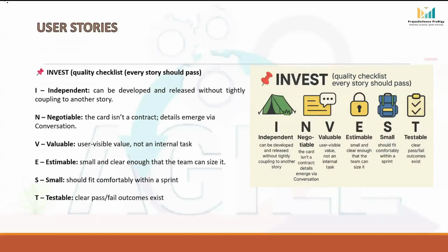INVEST. This is a quality checklist for user stories. Every good user story should pass this INVEST test. What is INVEST? I for independent. A user story should stand on its own. This means it can be designed, developed, tested, and delivered without being blocked by another story.